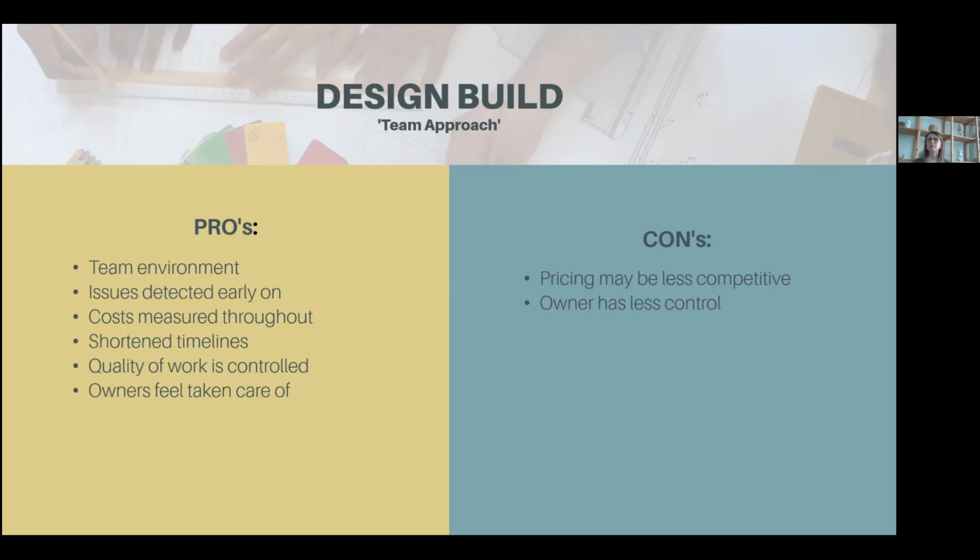The cons, pricing may be less competitive. Because you are bringing on a team that works together, you're not going out and tendering 3 bids from the electrician or 5 bids from the flooring company.